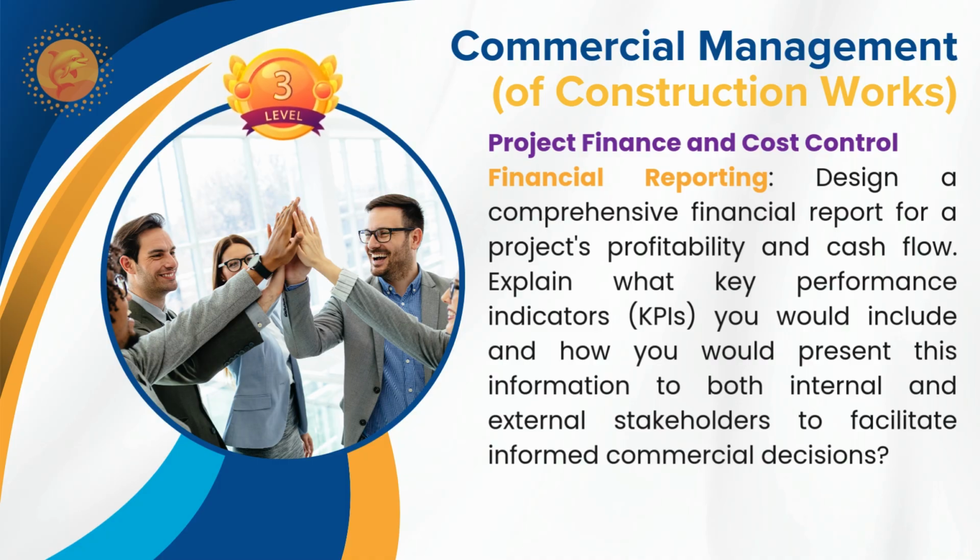And when you are doing that, there are adjustments like advance payment. You received advance payment well in advance before you commence the works, and retention is there, which is going to be paid after successful completion of the project and after successful completion of the defects notification period. So this cash is going to be held until that period. How are you going to manage without those things?